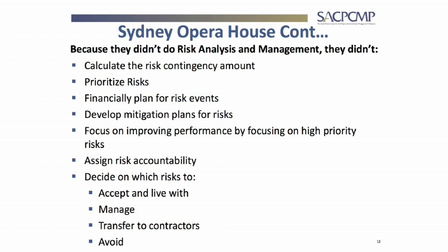Now, if you have risk contingency, you could do a few things. You can buy out a production line. So you can go to the guys in Italy and say, look, we're pressed for time, we don't have 40 weeks, we actually only have 36 weeks in our schedule left. We must still install the valves, etc. So can we buy out the production line? They'll probably say yes. They'll say, yeah, it will cost you, let's say, 10 million rand if you want to buy it out.